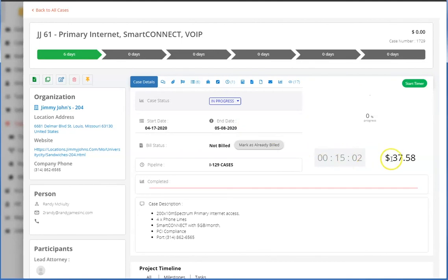If you have an employee that you're billing for a specific time, then it will automatically calculate how much you've spent based on the bill rate of that employee. When you create your employees, you can actually assign that you're billing $125, for example, for that individual employee, and it will automatically calculate how much billable time you've allocated to this project. If you do set your budget on a project, you could have a quick summary and quickly see whether you are under or over budget. Once you exceed this budget, this amount will turn red.